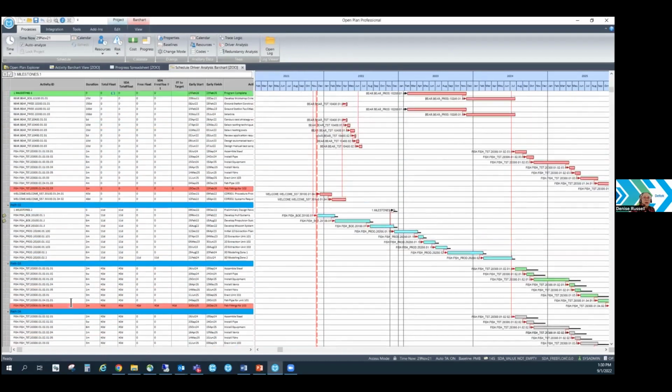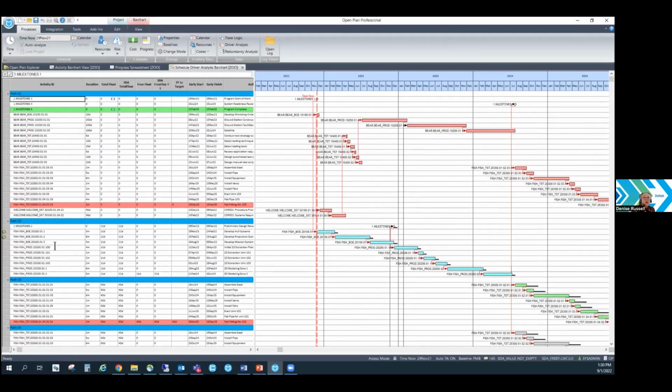So I have all of that information, and if I have a subcontractor that is performing work, I can go back to them and say, this is where you are influencing my critical path. These activities really need to be the activities that you make sure do not overrun and are not delayed. And I can ask if there's anything I need to do to make sure those delays don't happen.